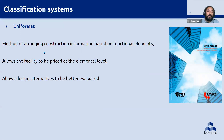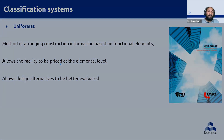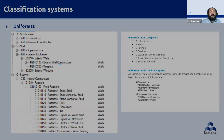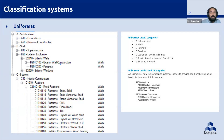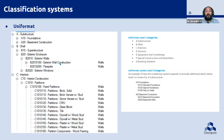UniFormat divides construction information based on functional elements of the project — allowing the facility to be priced at the elemental level. Categories include substructure, shell, interiors, service equipment, and so on. Drilling further down reveals different activities and elements within those categories. These individual elements can be coded back to the model to help sort information properly when using it for quantity takeoffs.